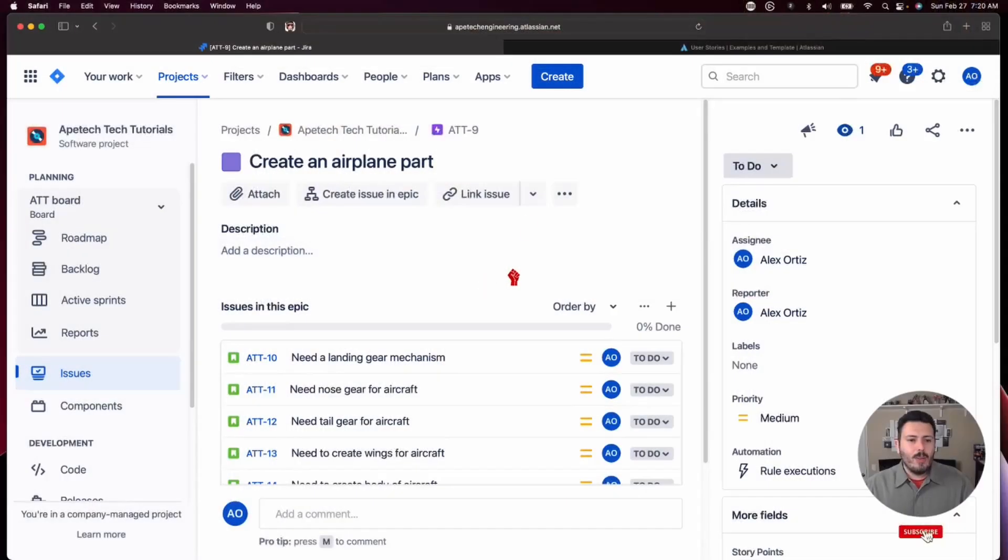Now, one little bonus that I want to add here is when you're in a company managed project, you're allowed to create stories from other projects. So you're not limited to the epic and the stories to live in the same project as the same team. So if you have different JIRA projects for different technical teams and they need to collaborate, an epic can only live in one place and one JIRA project. However, the stories can come from anywhere and the way you would want to associate that story to this epic would be to go only through opening the story and clicking on that epic link. So if you do that, that will associate a story from another JIRA project to this particular epic. That's really powerful. Let me show you what that looks like real quickly.